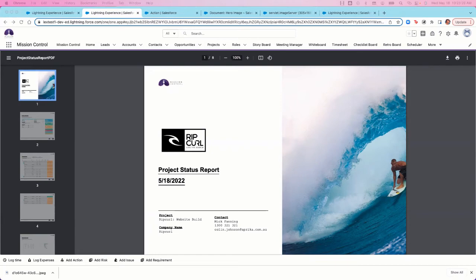So the result of that formula, if it equals 1, then your project is running exactly to budget. If it's lower than 1, then you're running over budget. And if it's over 1, then you are likely to deliver the project under budget. So 1 or higher would be better.